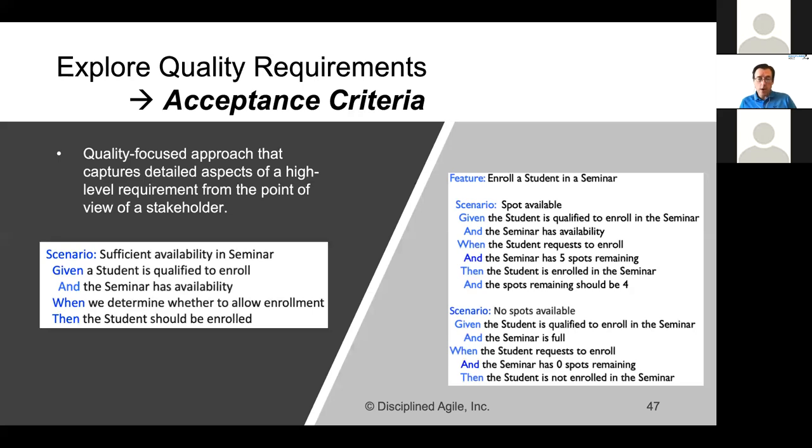In the old days, we used to call those test cases. Nowadays they're called acceptance tests. So you have acceptance criteria, which don't have values, then we have acceptance tests that actually have the real values. And those are typically firmed up either just before the iteration or during the iteration. Some people ask me, what do the testing specialists do while they're waiting for stuff to be built? Well, they're typically getting ready to test. And they might take these acceptance criteria, create a one-to-many relationship between an acceptance criteria and a set of tests with real values, and then be ready to execute them.